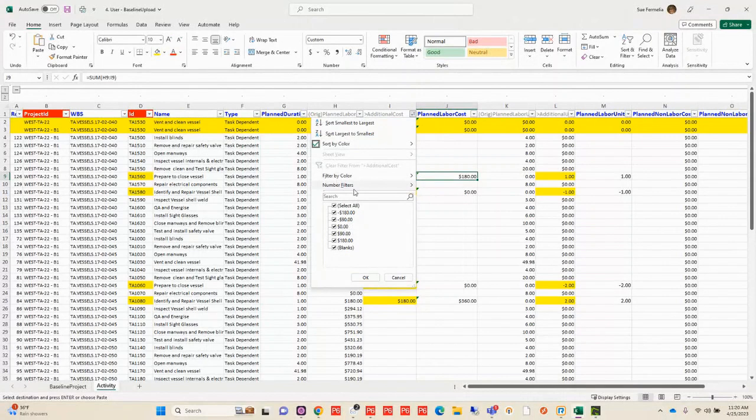Now, for the projects that I want to use, in my P6-Loader area under my demo, I want to pull out that sheet and those columns for the 2 projects that I'm going to be having updates on. So if I wanted to keep those projects and have them be part of my definition every time, I could then go in and save and say, okay, I want to save these in my project updates. So I could tell it to save to that, and it's going to then maintain those projects the next time I go to run this. So I'm going to go ahead and extract, and it's going to bring out that information for me.